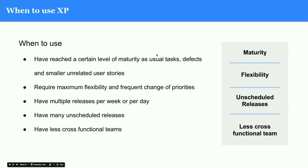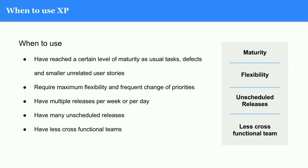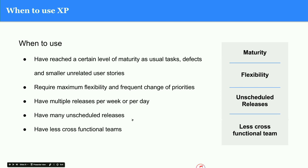When to use XP: when you have reached a maturity where most of the coding is done and you need to move into more complicated parts requiring quality and focus. Also when you require maximum flexibility and frequent changes of priorities, when multiple releases per week or per day are needed since iterations are very short and continuous integration is promoted, when there are many unscheduled releases, and when you have less cross-functional teams.